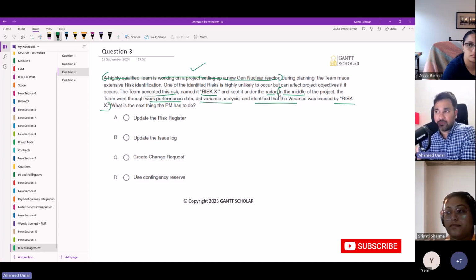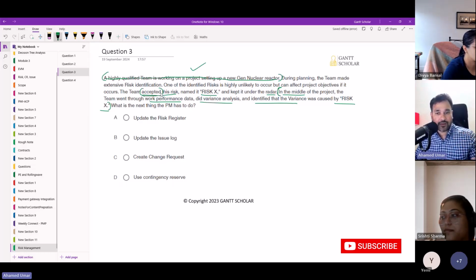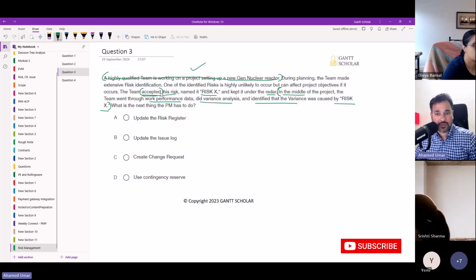Normally, if you identified this risk and didn't go with the accept strategy, instead you had some risk response, let's say a mitigate strategy, then after the occurrence of the risk, though now it became an issue, you will mitigate it with the planned risk response. It's like your system is getting affected with a virus. You already identified this and you are prepared. You have the antivirus software. Now you're going to run the virus scan, and remove this virus from your system.